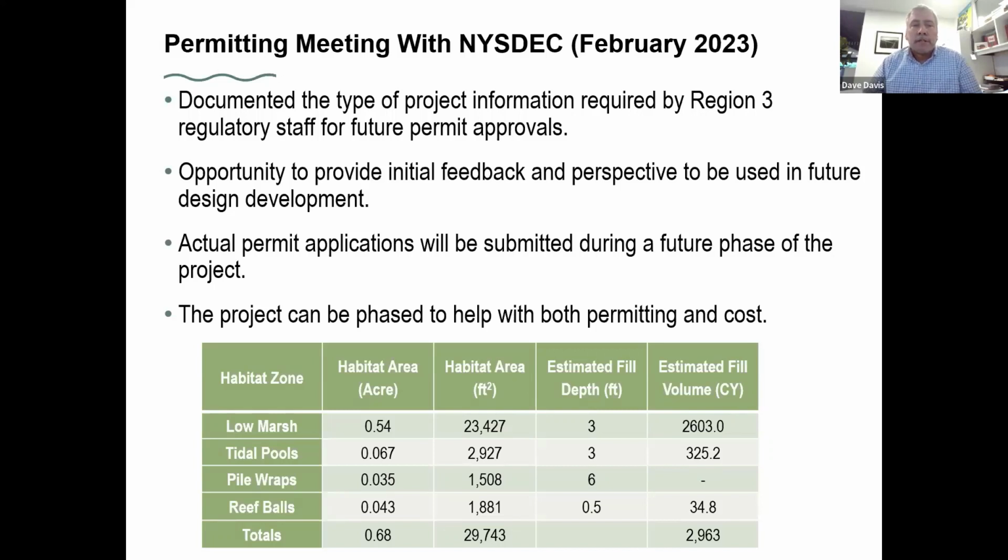So it's also an opportunity for the agencies to provide initial feedback on what they think could potentially be permitted and what might be some of the permitting challenges. We found over the years it's really useful to engage early with the regulatory agencies, get them familiar with the project, and get their input early on to avoid any last minute pitfalls during the permitting process. Acquiring the actual permits was not part of this project, so that will be under a future project funding.